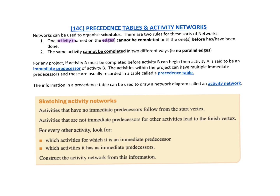You can't say we'll cook the toast another way — it's just cooked the same way and we wait until it's done. For any project, if activity A must be completed before activity B can begin, then activity A is said to be an immediate predecessor. Activities within a project can have multiple immediate predecessors, and these are recorded in a precedence table. The information in a precedence table can be used to draw a network called an activity network.